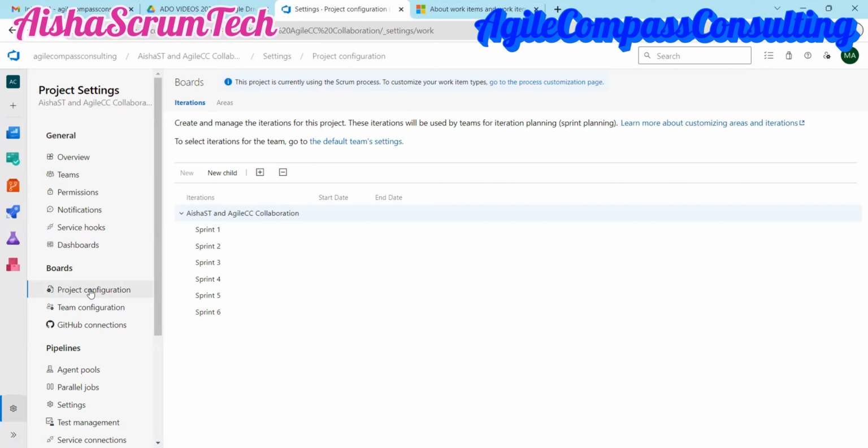So what happens is that if you want to do your sprint settings, it is very important that you consider doing it under project settings so that the sprint applies to every team in this project. That way we have a set workflow. We all start at the same time and end at the same time, and it keeps everybody in check, right? And also even the meetings in check if we need to give reports and all of that good stuff. So that's what you can do.